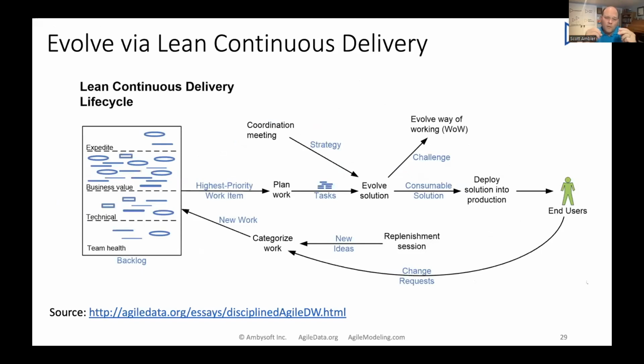So what we want to do is have more of a lean, Kanban-based approach in this situation. So once our data warehouse is up and running in production, if we've got the skills and if we're allowed to do it based on the culture of the organization, we switch over from more than likely a Scrum-based approach with these small batches of work called sprints, and instead move into more of a continuous flow type of work, where I'm pulling one item out of my backlog at a time, whatever's the most important thing to work on right now, and we get it done, right?